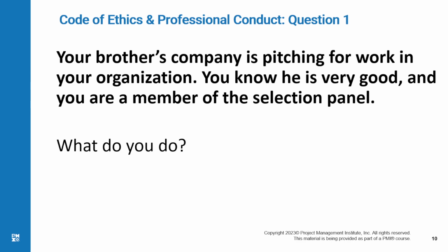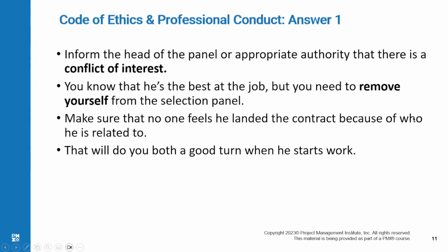So I'll give you more time than is needed. So let me review the right answer. This is clearly a conflict of interest, no doubt about that. It's your brother. So inform the head of the panel or the appropriate authority that this is a conflict of interest. This is your brother. And then remove yourself from the panel.